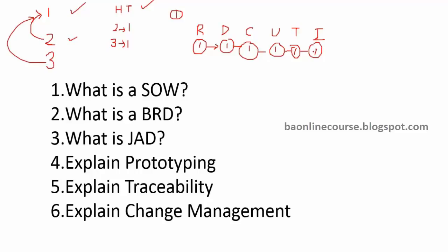So it's all requirement 1 which is tracked, but you're linking the deliverables from each phase so that you can clearly understand that this requirement is being translated into the various other phases. Since it goes through each phase, we call this vertical traceability. You have your requirements, then design, coding, unit testing, and then implementation. And since there are requirements 1 to 3, and you are linking them with one another, we call that horizontal traceability. Hope that clarifies your question.